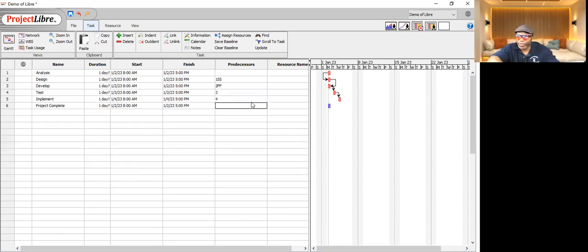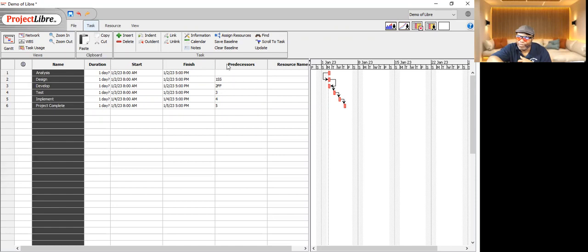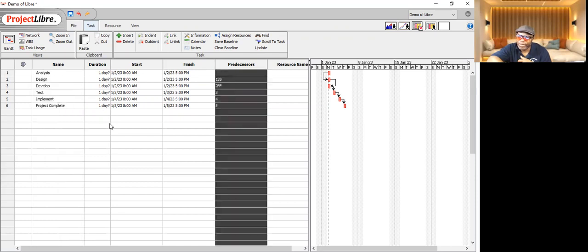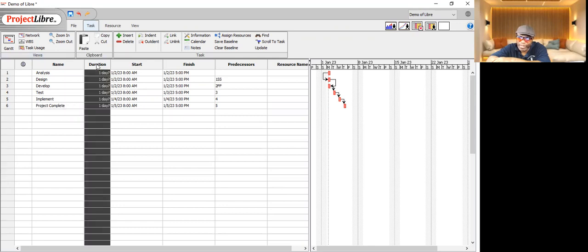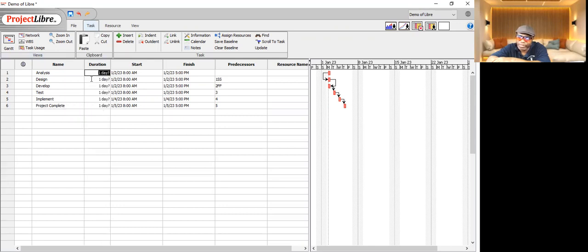It's very straightforward, and honestly, I think it will be a great exercise for anyone who's gotten certified. We'll put in the durations now because we've done define activities. Now we've done sequence activities. Now we're going to do estimate the duration. So in the real world, I have to make this very clear for people who are in doubt of themselves. In the real world, this is not something you have to do by yourself. The experts working on the project will tell you how long these things will take.